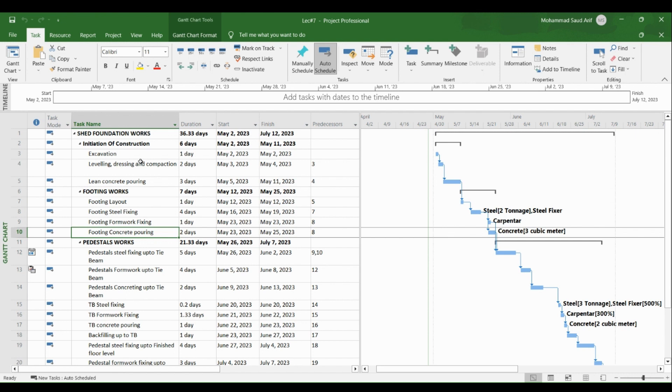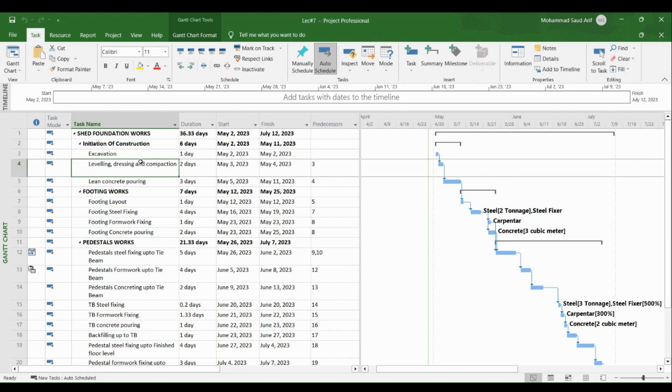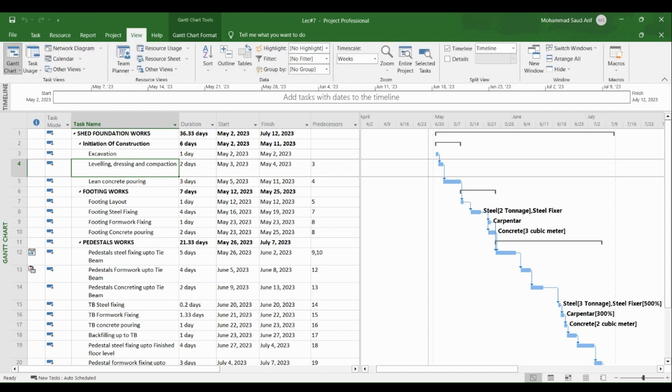If we have a schedule of 1000 activities, there's a possibility we might miss something. This look ahead schedule will serve our purpose. For creating a look ahead schedule, we will go to the View tab